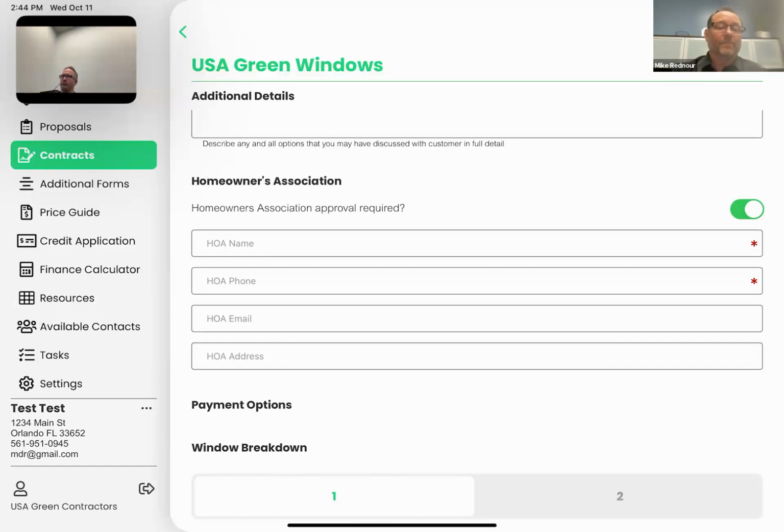They're going to have to email that HOA and get the documents signed that they need. Customer says, "How long is this job going to take?" I say, it all depends on your HOA, Mr. and Mrs. Customer. Some HOAs only meet once a month, and if it's the beginning of the month and they don't meet in the month, there's 30 days shot right there. And then if they sit on it at any length of time, that's 6 weeks gone by.